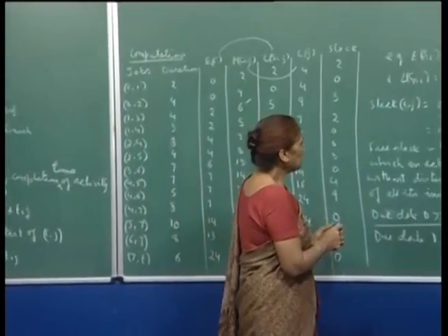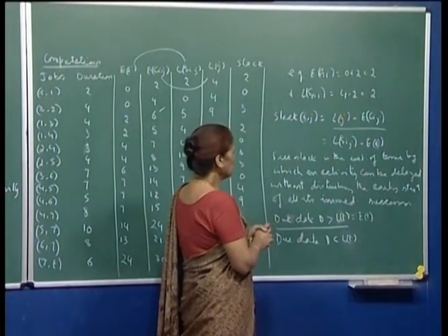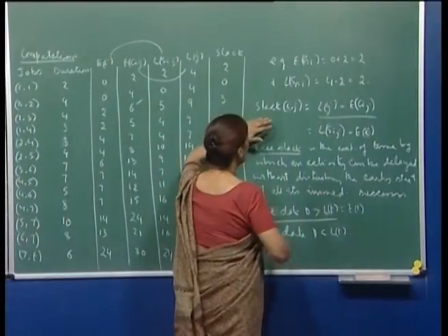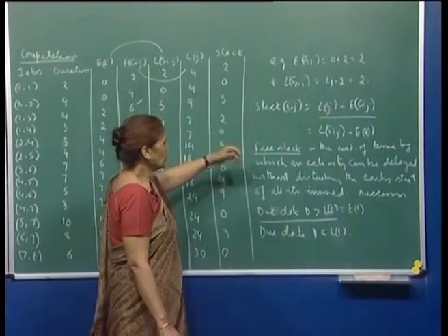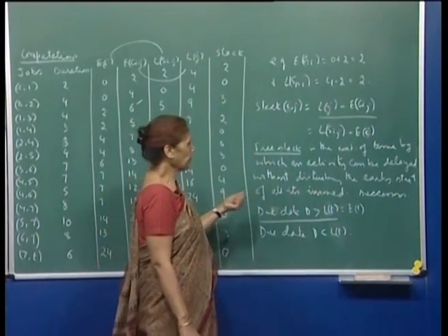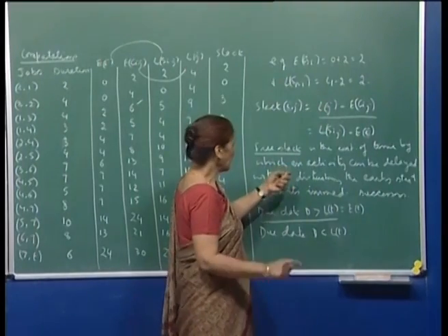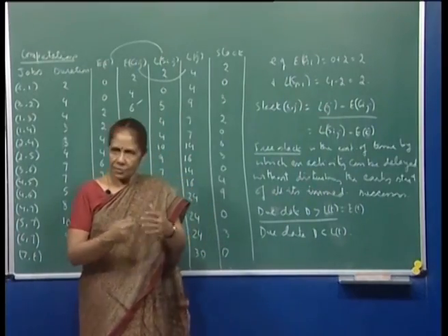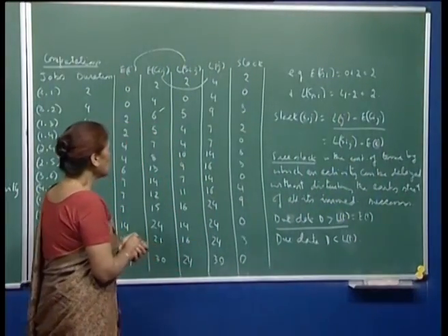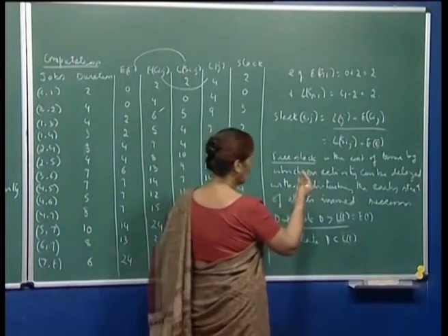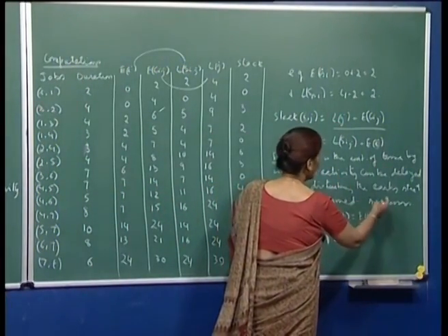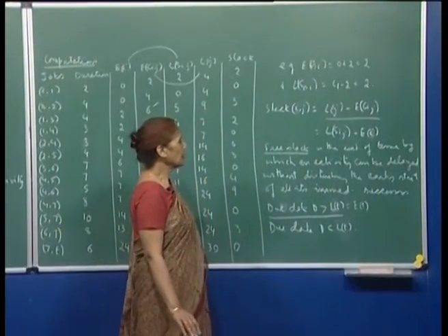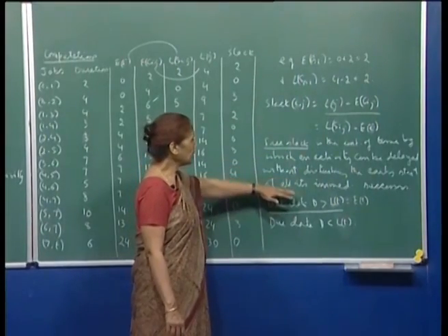Okay. Now, of course, I did not think that it was really necessary to go into it, but anyway I will just define this term for you. You can fine tune the slack, because there is also this concept of free slack, which is the amount of time by which an activity can be delayed without disturbing the early start of all its immediate successors. Defining this would require a little more effort, but one can look at it while you are reading some more literature.